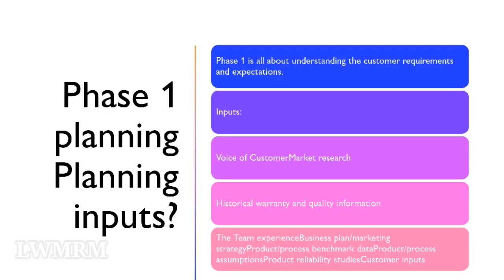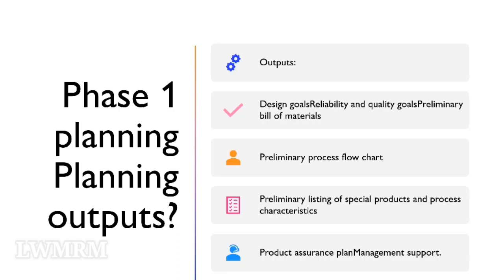Phase 1 is all about understanding the customer requirements and expectations. Phase 1 inputs: voice of customer; market research; historical warranty and quality information; team experience; business plan and marketing strategy; product and process benchmark data; product and process assumptions; product reliability studies; and customer inputs. Phase 1 outputs: design goals; reliability and quality goals; preliminary bill of materials; preliminary process flow chart; preliminary listing of special products and process characteristics; product assurance plan; and management support.